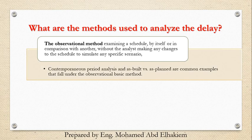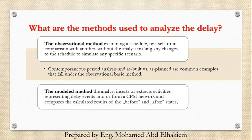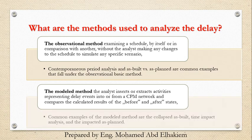Contemporaneous period analysis and as-built versus as-planned are common examples that fall under the observational basic method. The modeled method: the analyst inserts or extracts activities representing delay events into or from a CPM network and compares the calculated results of the before and after states. Common examples of the modeled method are the collapse-as-built, time-impact analysis, and the impacted-as-planned.